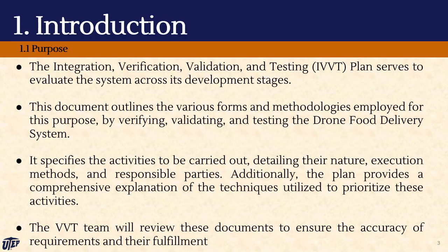The integration, verification, validation, and testing plan serves to evaluate and validate the system across its development stages. It outlines the various forms and methodologies employed for this purpose, as the name suggests, by verifying, validating, and testing the drone food delivery system. It specifies the activities to be carried out and the techniques utilized to prioritize these activities. The verification process activities will determine if the system was implemented correctly, while the validation process activities will determine if the system delivered meets the customer's requirements. The IVVT team will review these documents to ensure total accuracy and fulfillment of the requirements.